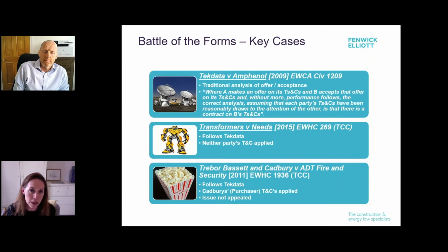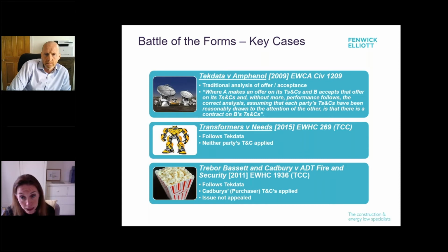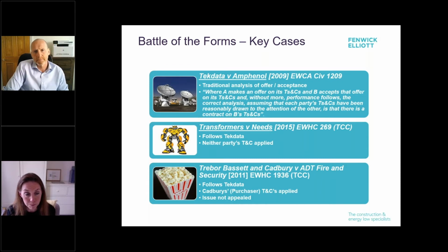ADT sent a quotation referring to terms and conditions, but not attaching them. There was no evidence that they had been provided previously. Cadbury's sent a purchase order referring to T's and C's already supplied and available on request. Then the work started. Who won? Well, following Tech Data, Cadbury's did. There was no challenge to its T's and C's before works began. It had fired the last shot. So Cadbury's were party B in the Tech Data quote.